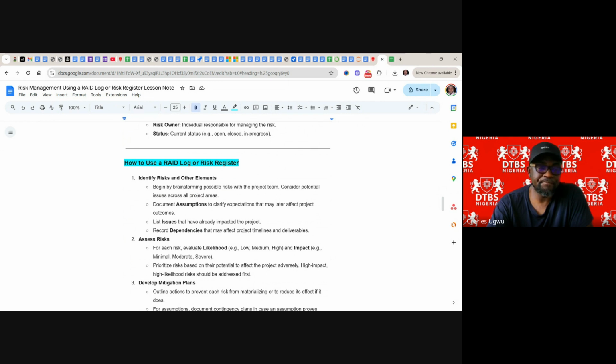And after today, we are going to start having a meeting on a regular basis. Not any other meeting you have been having, it is specifically for capturing and managing risk, managing the RAID log. You are going to call it the RAID meeting. It's a statutory meeting that should happen every week. So every week we should be able to look into what has happened, what risks we have captured.